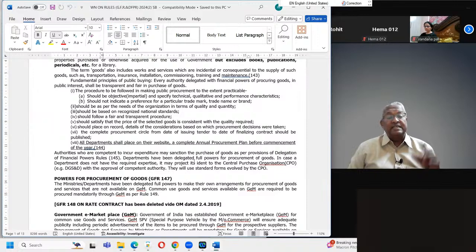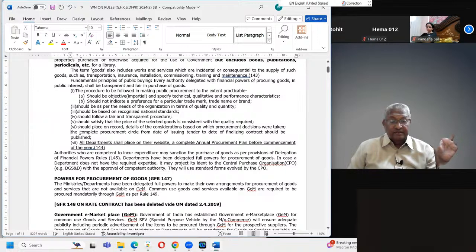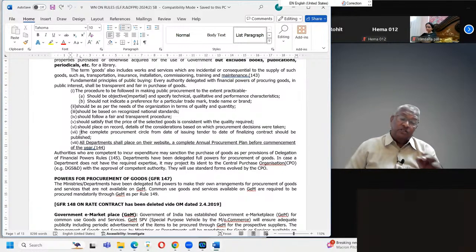और सिर्फ टेक्निकल कोटेशन जिसका एक्सेप्ट होता है उन्हीं का फाइनेंशियल कोटेशन फिर खोला जाता है. सो दैट इज हाउ टू बिट सिस्टम दैट इज डन. So should satisfy the price of selected goods is consistent with the quality. So आपको क्वालिटी क्या चाहिए और उसके मुताबिक रेट है कि नहीं. It should be, the price should be commensurate with what is the quality.